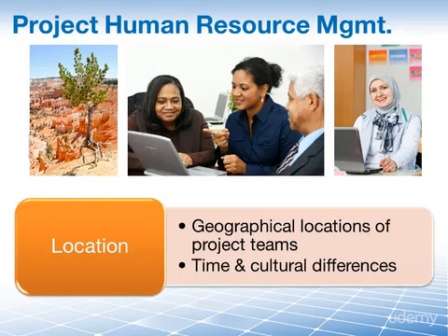You're going to have to work with the people who currently work in those 15 locations to try to understand what kind of people are needed on the project, what kind of cultural differences are there, and trust that these people locally will find the right personnel to hire locally for your particular project.